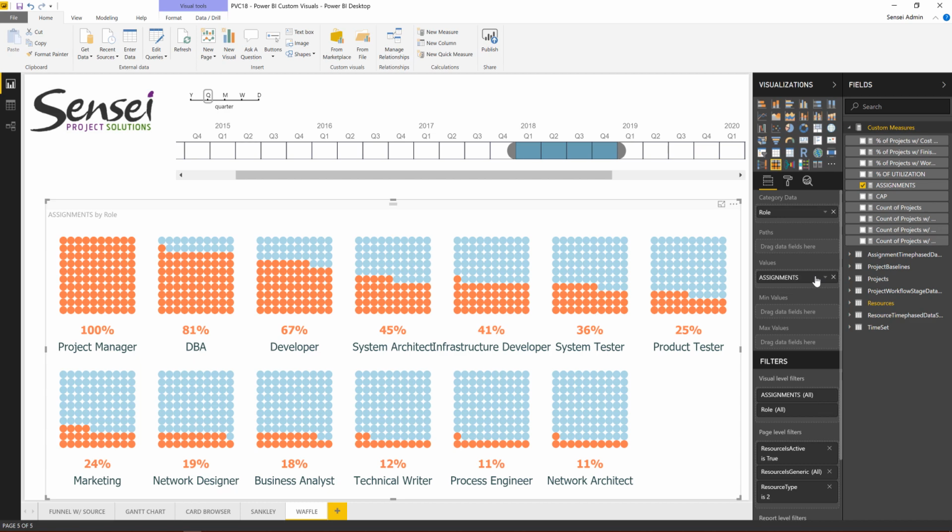In a nutshell, or in summary, we may say that our project managers are being used 100% of their time, right? So is this something that we can really trust? I don't believe so, and the reason is we do not have something to compare to. I know that people have been assigned to tasks in my schedules. However, what's their capacity? I should have the information about their capacity in order to deduct the assignments from capacity, and then I would be able to really see the percentage of utilization.